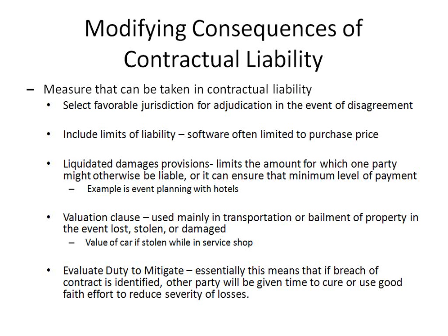Evaluate duty to mitigate. Essentially, this means that if a breach of contract is identified, the other party will be given time to cure or use good faith efforts to reduce severity of losses. So typically, once we say, oh, this is a breach of the contract, you just don't say the contract's done. I mean, in some cases it might, but a lot of times there'll be provisions to say we'll have 2 weeks to cure the situation once we're notified that there's a problem with the software, or whatever, the construction or things like that. That we'll be given an opportunity.